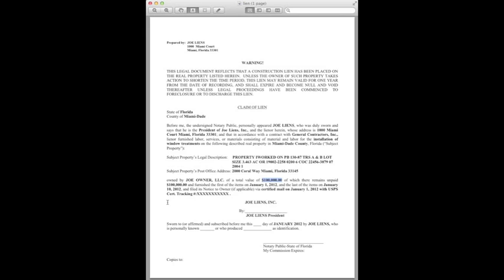You may also include extras and change orders which were authorized by the owner. However, you cannot include such things as delay damages or other expenses arising out of any breach of contract. In the case where a lienor has not fully completed their work, the claim of lien should not include lost profits on work not yet performed. And obviously it should not include work not performed, even if it was in the original contract or the original contemplation of the parties.